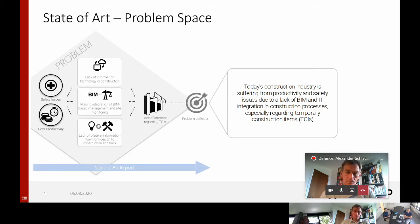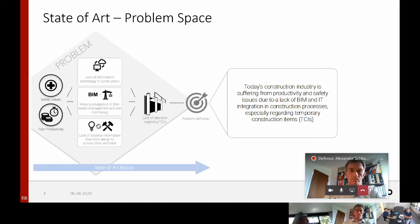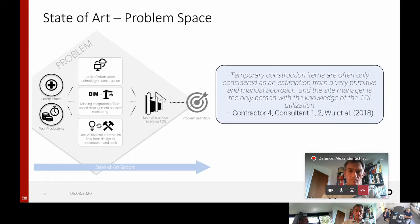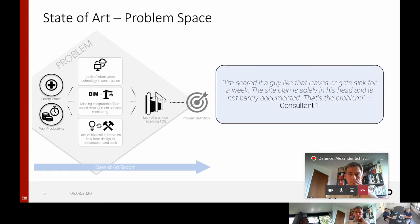In order to support this problem space and prove the relevance of my thesis, I would like to present a few quotes which I experienced in the thesis development. For example, Contractor 4, Consultant 1 and 2, as well as the paper Wu et al. from 2018, revealed that temporary construction items are often only considered as an estimation from a very primitive and manual approach, and the site manager is the only person with knowledge of the TCI utilization. Consultant 1 also mentioned that he's scared if a guy like this leaves or gets sick, because the site plan is solely in his head and barely documented — and that's a real problem.